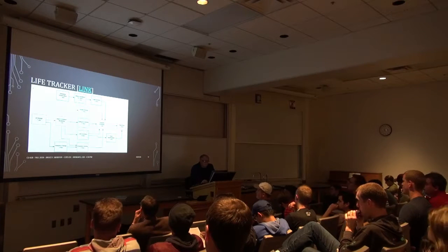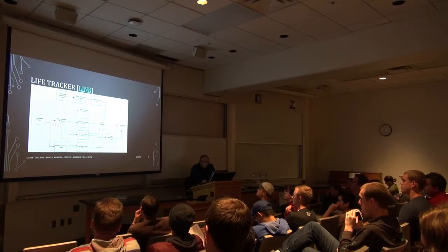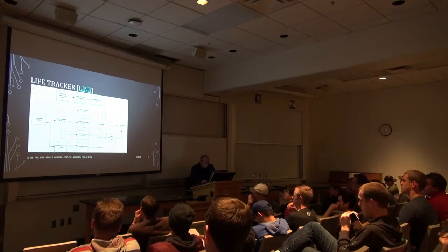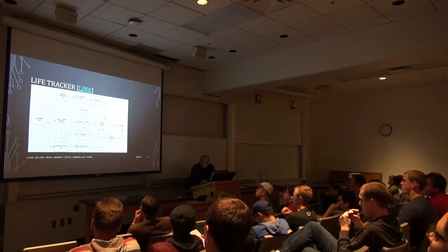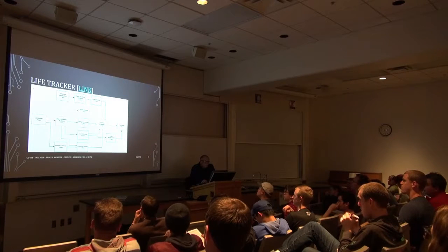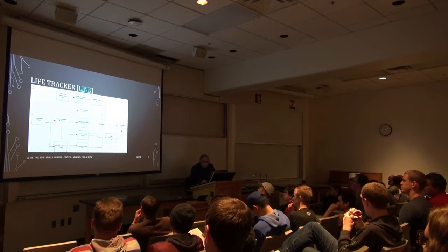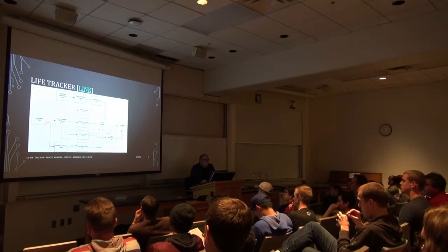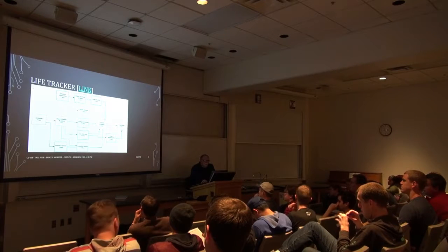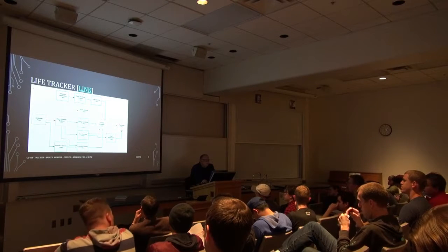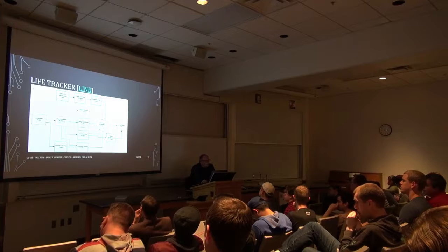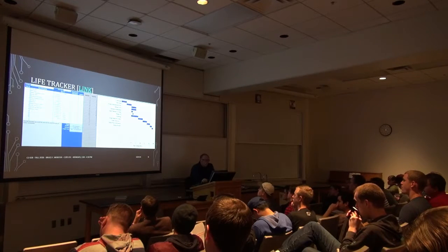So there's a critical path in there. The one thing, our timeframes are pretty short, our things are pretty simple. So one thing we didn't put on there, that we can, after those final tests, is the additional features that we can add. We have a lot of time if things go late, right? But if things are on time, we'll have lots of time to go through and do extra functionality. Which is a great approach to have.